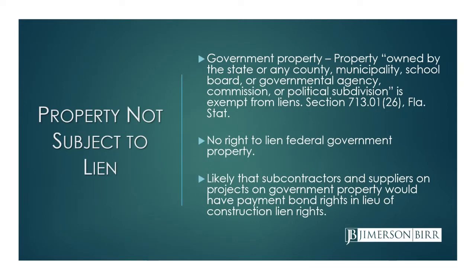That same thing is going to apply to federal government property, a postal service or a federal government building. You're not going to have lien rights to any of that property because it's owned by the government. But there are bond rights typically for that kind of project, and that's something we're going to discuss in more detail in the next webinar. But just understand that for federal projects, you'd have the Miller Act that will typically protect subcontractors and suppliers, and then on state and local government projects, depending on the size of the project, you'll have Florida's Little Miller Act, which is in Florida Statute 255.05.